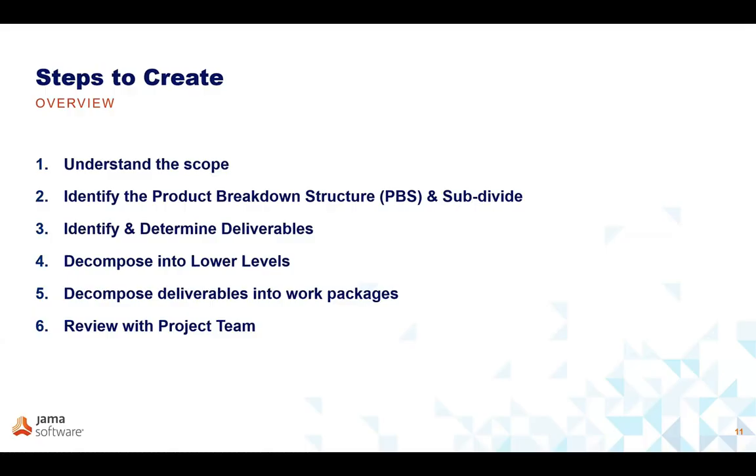Therefore, when you're creating the steps of the work breakdown structures, project managers probably should consider the what more so than the how. When you make a work breakdown structure, use nouns instead of action words to keep the focus on those deliverables themselves as opposed to the activities, right? And again, the work breakdown structure is not a to-do list, right?